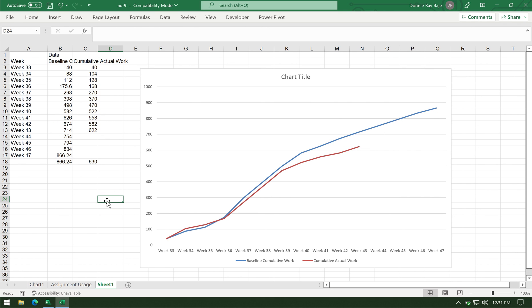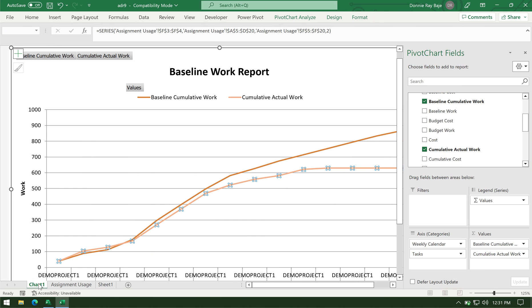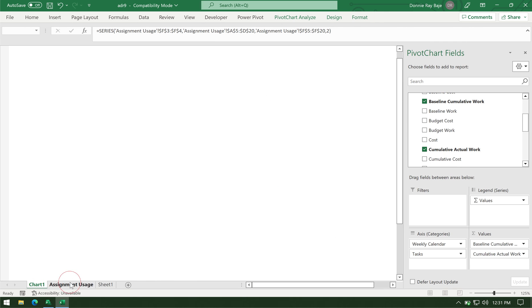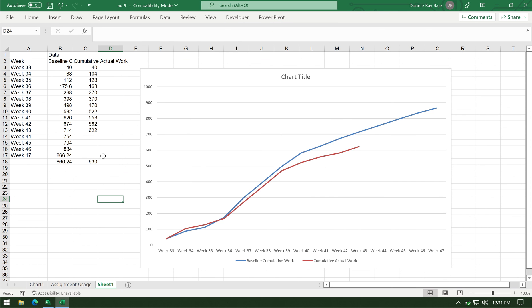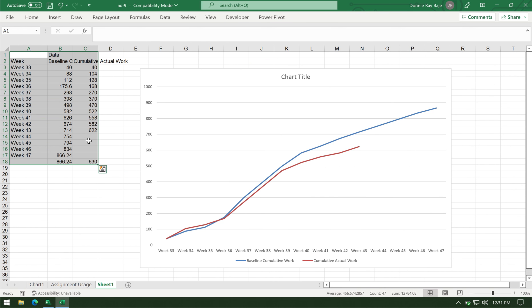Actually, the procedure is the same if you're trying to create an S-curve that shows the baseline and the actual for completed projects. The only difference is that this one will technically do. But if it's still ongoing, then you have to copy-paste the data in a different worksheet so that you can remove the weeks that are still ongoing.